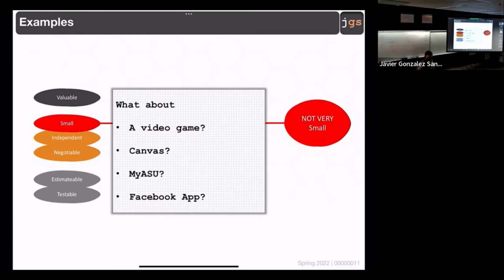For the maze, that is another thing that I consider a requirement. Again, why? Because the maze is not going to be used as a simple picture. When we think about the maze, and you explain to me what is the maze in the Pac-Man, it is something that is changing, right? So there should be an algorithm there to calculate the walls. So again, it's not something that is going to happen in a couple of hours, but something that we need to think more about. And there are several graphical elements involved. Couple of days, 1 day or more, a requirement. Drawing the Pac-Man, drawing the maze, moving the Pac-Man, the algorithm for the maze, whatever is the sentence that you put, those are 2 things that are requirements for the particular video game.